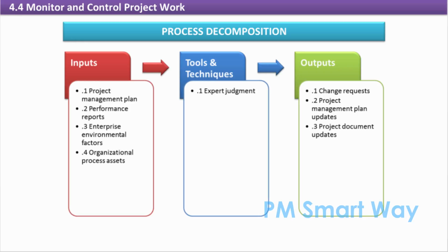We are not looking only for current variances but also future variances based on current trends. Variances that are already occurring will require corrective actions, while trends may need preventative actions. Neither corrective nor preventative actions are taken on the spur of the moment but are instead treated as change requests to be submitted to Integrated Change Control for evaluation.